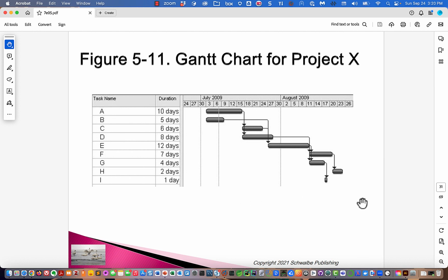So if in that kind of project you go through this subsequent phase and you level the schedule, it could double the time. It could triple the time. Okay? Especially if your schedule is showing all your programs being written in week one by your theoretically 100 programmers that you don't have.